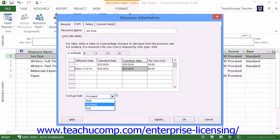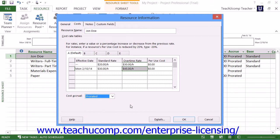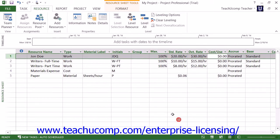However, you can also incur the entire cost at the start or end of the assigned task. Once you've set the desired costing data within the Costs tab of the Resource Information dialog box, be sure to click the OK button to save your changes.